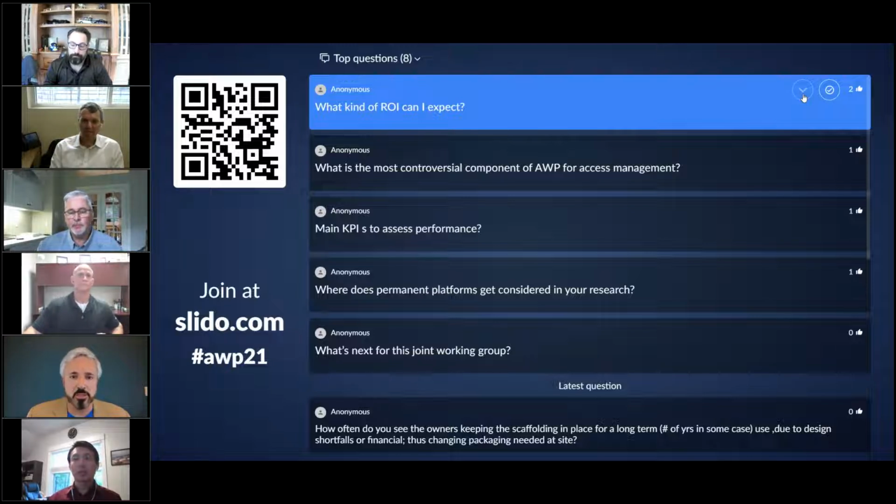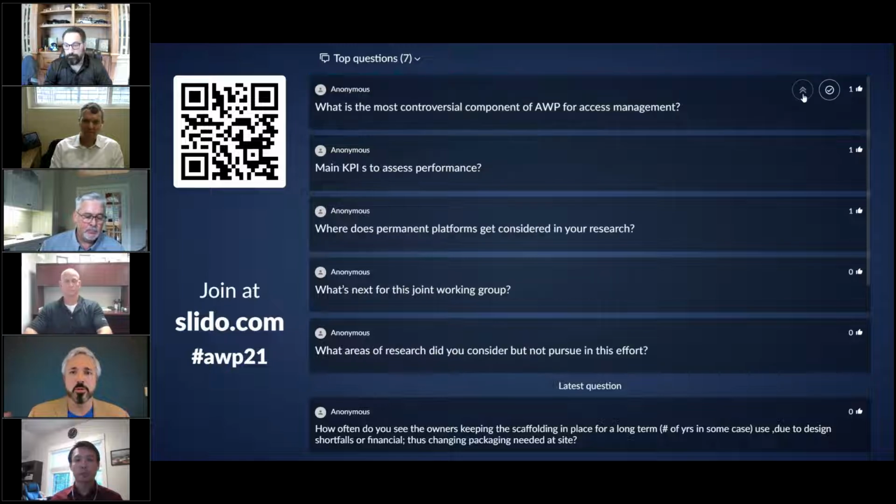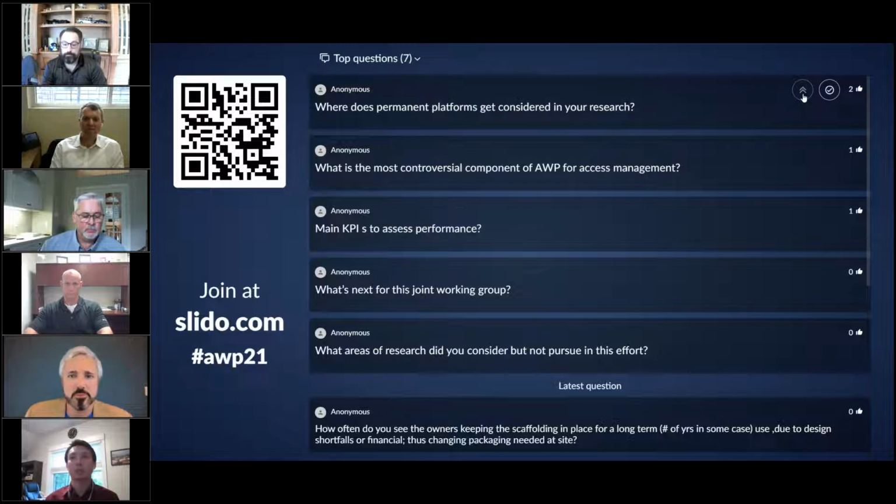And then maybe Josh, I'd like to offer a different perspective on that as well. In terms of ROI, we think about project costs in terms of the actual dollars, but I think another aspect to this best practice is it will give you cost certainty on a project. So even assuming, and this is a bad assumption, but even assuming there's no cost difference, if you know at the outset of the project what the scaffold number will be at the end of the project within a much narrower band than we do today, I think that in itself is valuable to the project. Great point on that one.